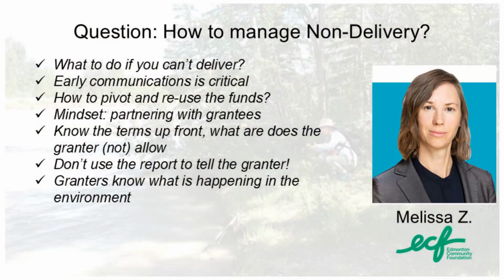Also knowing your initiative, also knowing what the terms are up front. From ECF's perspective, we'll say a 10% change in budget, connect with us. So what is the grant maker's terms around changes to the grant itself? Don't let the report be that first point of contact where we hear about the change, because now we have a report and we have to go backwards, just like Carolina said in that pivot.